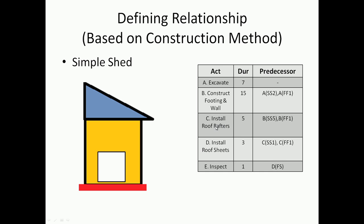Similarly, installing roof rafters will start only five days after the wall and footing has started, and can finish only after one day after that activity has finished - that is FF 1. And installing roof sheets: I can start one day after the rafters have started and it will finish one day after the rafter activity is completed. And for inspection, only after installation of roof sheets is done can inspection start, and it will take one day.